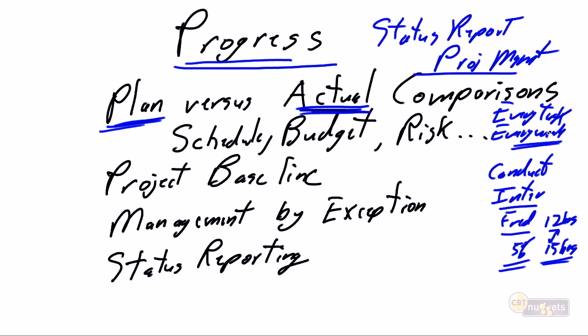And with these details, then we begin to understand, do I truly have a schedule challenge? Or did Fred simply go over for 3 hours on this one, but then when he is documenting results, which had a 10-hour estimate, he actually got it done in 8 because he had done such a bang-up job of conducting the interviews and writing his notes for the interviews.